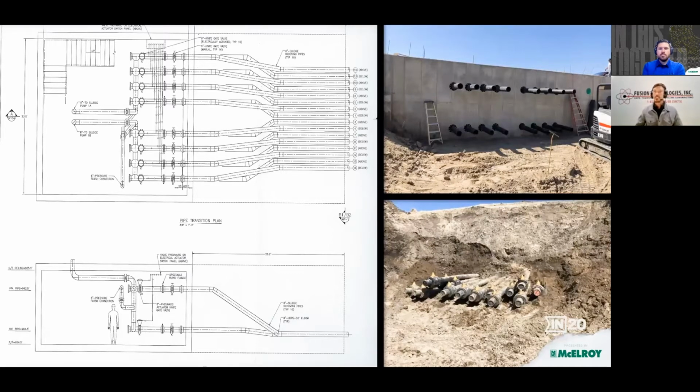After the construction of the pond, MnDAC wanted to use that for water retention capacity while the pump and the valve structures were still under construction. So while I was there, the structure in the top right here wasn't in place yet. They hadn't even broken ground to build that. That gave us about two months to plan and prepare for this project.